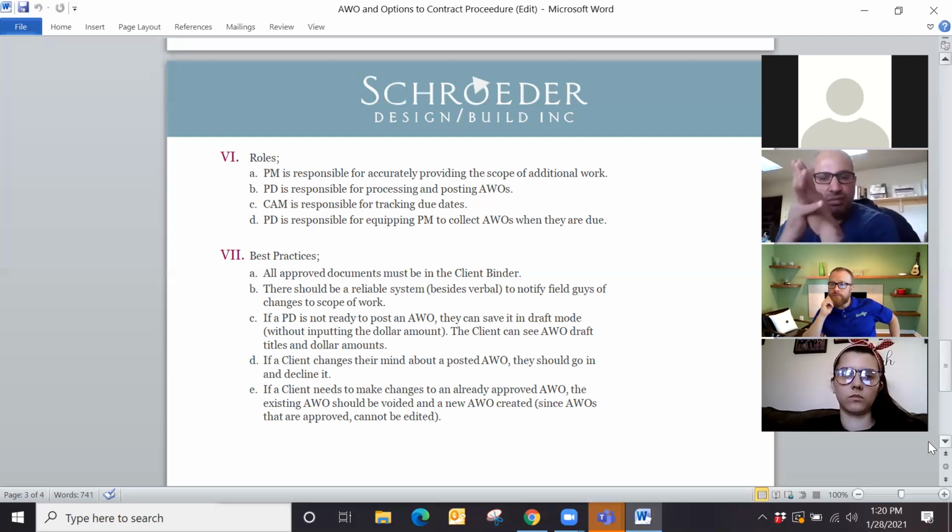If you're looking to start an AWO, because sometimes we have deadlines saying, hey, we want to have this posted by close of business today. So while the PD is waiting for some information back, she might start a draft and say, well, let me just get this draft started until I have everything I need. If you do that, please don't put any dollars in there. Clients can see it. And then if it goes back and changes later, it might be a conversation that they want to have with us.